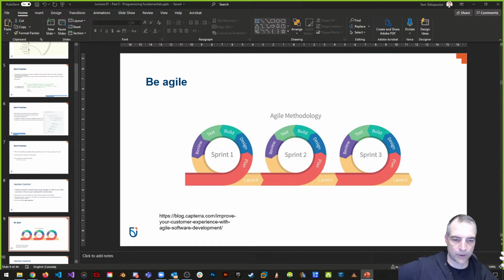And that might mean a brainstorming session when you and your team go away and start thinking about this stuff. And then think about it from a 2 to 4 week iteration process. For us, because we're at university, it's not 4 weeks, it's 2 weeks. If you can't build a feature within 2 weeks, take that feature out of your game for this semester. Don't include it, right? Or maybe it could be a bigger feature that you build up over several iterations, but then plan for it to come into the game later on. Okay, so think about it from that perspective.